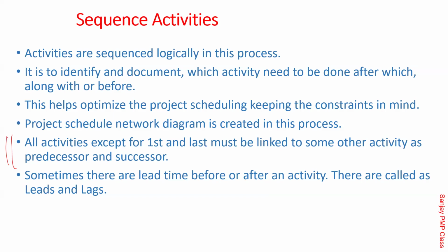So there are multiple starting activities. Now all of them will not have a predecessor. Similarly, there could be multiple terminal activities for a project, so all of them may not have a successor. What we teach in MS Project, and I'm sure Shishir, because you are using it, you will know, is that you end up creating two dummy things called project start and project end. All the starting activities link the project start as a predecessor, and all the terminal activities put a successor as project end.